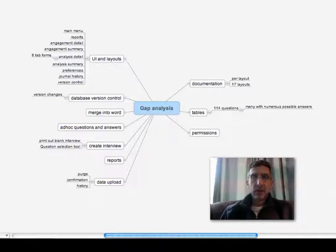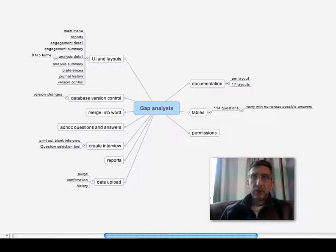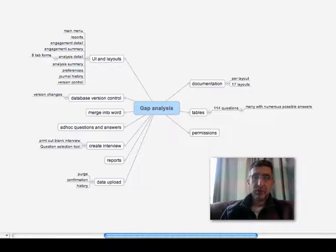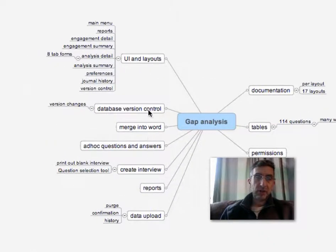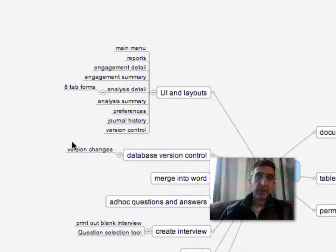So how do you create a Work Breakdown Structure? On the screen here is a breakdown structure I did for a project where I used a mind mapping tool called Mind Manager. That's a very nice approach because it gives a visual representation of what you're going to do, and you can move things around the page. Here you see the major milestones, which are the large area buttons or words, and next to each is the beginning of the breakout for each section.